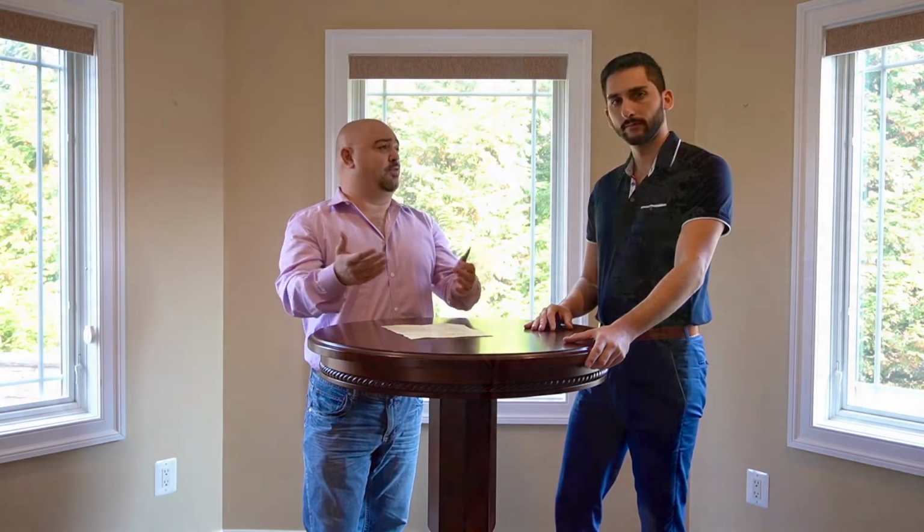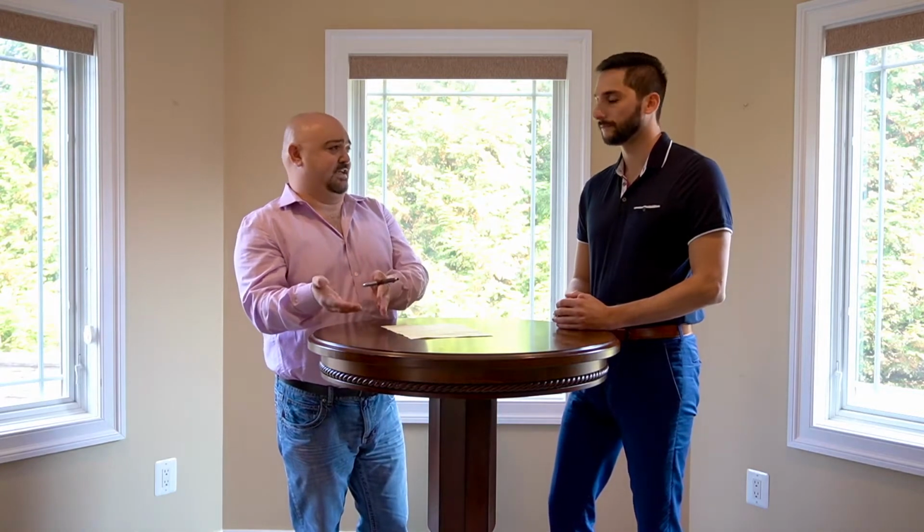Usually, average dental offices, we're talking about 2,000 to 5,000 square feet. Once you start construction and there are permits, you're looking at a 10-week to 12-week process, depending on the size of the space you're going into. In a 10-week process, your first step is, once we have the permits, we chalk it out for clients to walk them through and understand what they're seeing on paper for design matches what they're actually physically seeing on site.